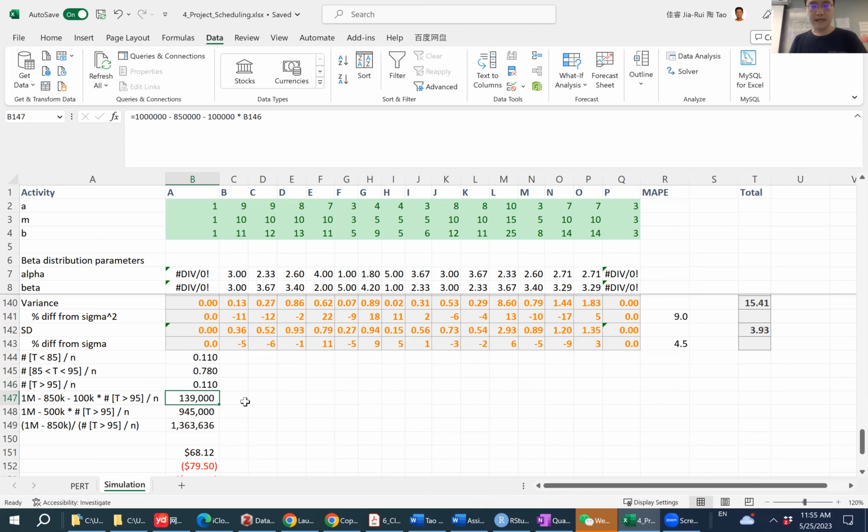As you can see, doing a simulation is not complicated, and in many cases it gives us a much better result than if we depend on some approximated distribution. And in reality, if we actually run a simulation, we would normally use a very large sample size, like 20,000. That's the regular threshold.